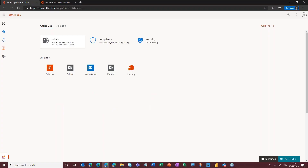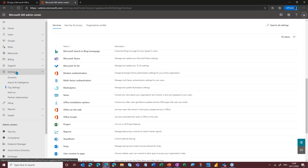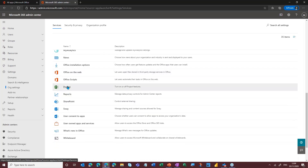As a start, I'm going to show you how you would switch on Roadmap in the first place. In order to do this, you have to be an Office 365 administrator for your organization. If you're not, then you will not be able to get access to this particular menu. So when you go into Office 365, you want to head over to the admin portal. Once you're in there, you're going to head over to settings, and from there look down the list and find Project, which we have listed here. Then click on it.